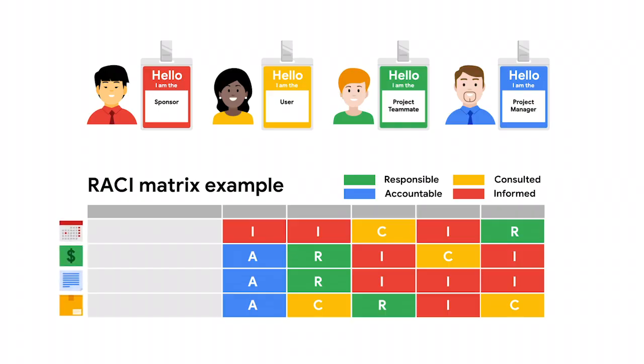Brainstorming is one of the most effective techniques for identifying risks with a team because it allows groups to spontaneously share ideas without judgment. As a project manager, you will be responsible for bringing a group of people together to imagine potential risks. Have your RACI chart at the ready to refer to when you decide who to invite to this meeting.